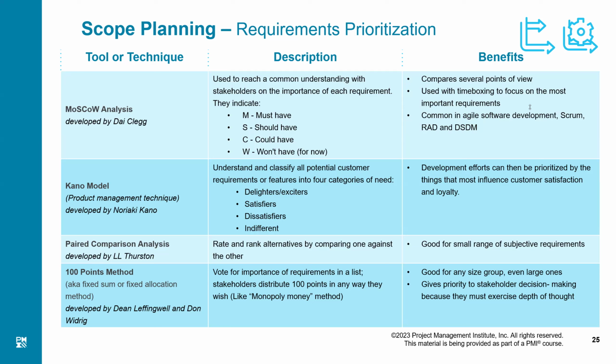Then we have the should-haves, meaning they are not as necessary as the must-haves, but if we do the must-haves, we probably have done our job. But if we are left with some time, we probably could do some of the should-haves. They are the second highest importance bracket. And I will try to do as many of the should-haves as possible.